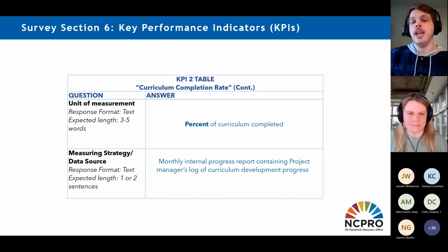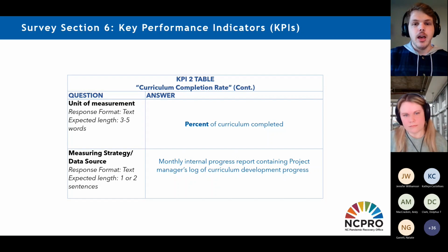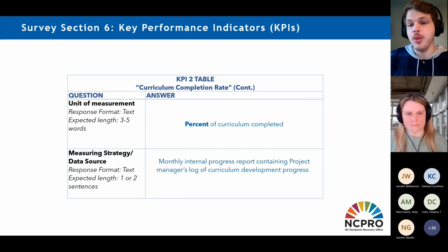Unit of measurement, we want it to be a % of the curriculum that actually gets completed. And then what is the measuring strategy or data source? It would be some internal progress report. So a project manager's log of the curriculum development progress.